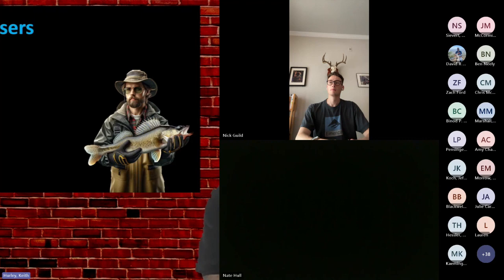So our advice to you here is to make sure from the very beginning that you involve these end users. The people that use the software in the end need to be at the table immediately when you start your project. Obviously, there's a period of time where you're going to sit down, kind of put together your list of requirements, what the database needs to do, what functions, what reports, what data, all that stuff that needs to be accumulated and documented. Involve as many end users in that as you can.